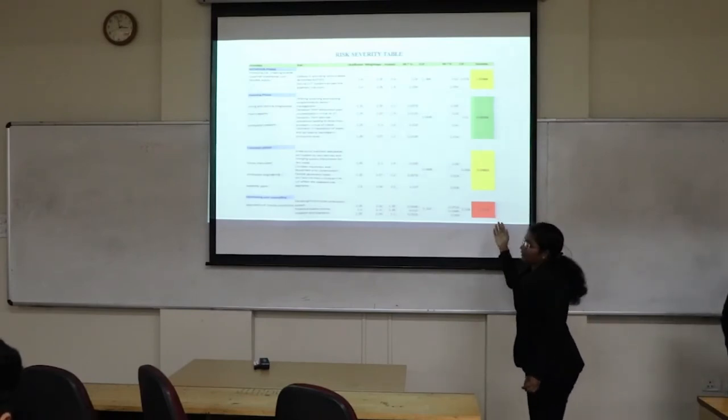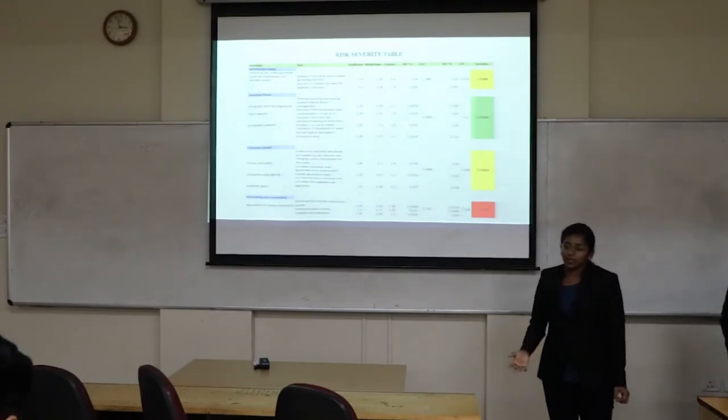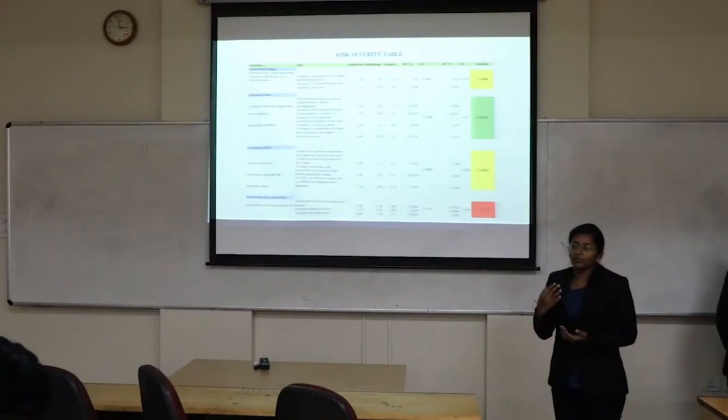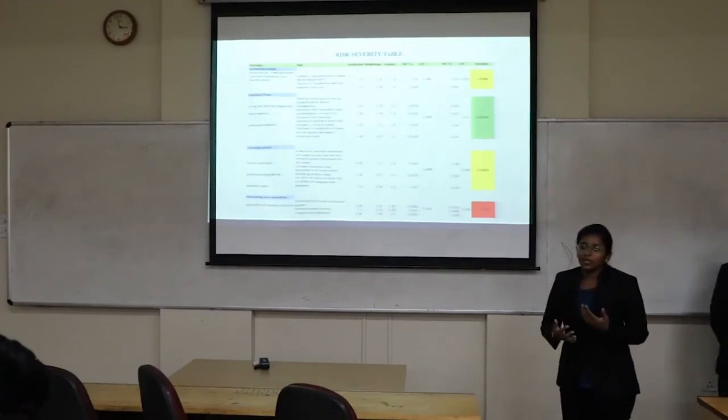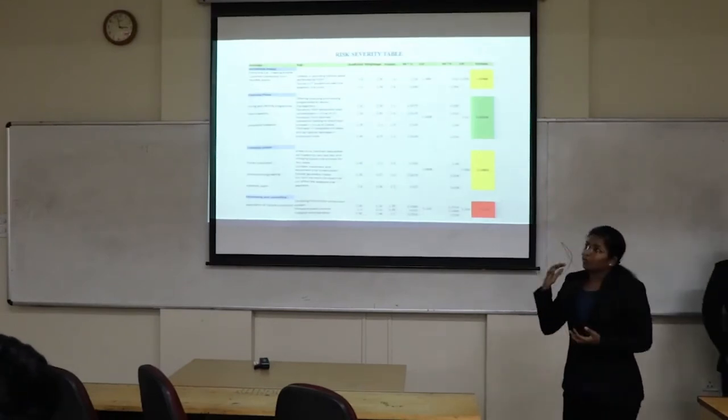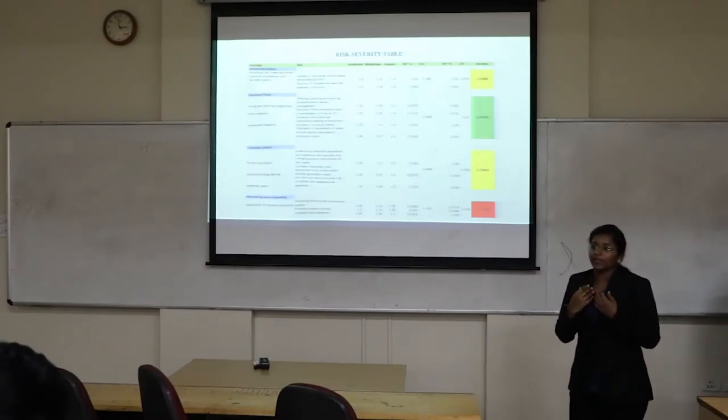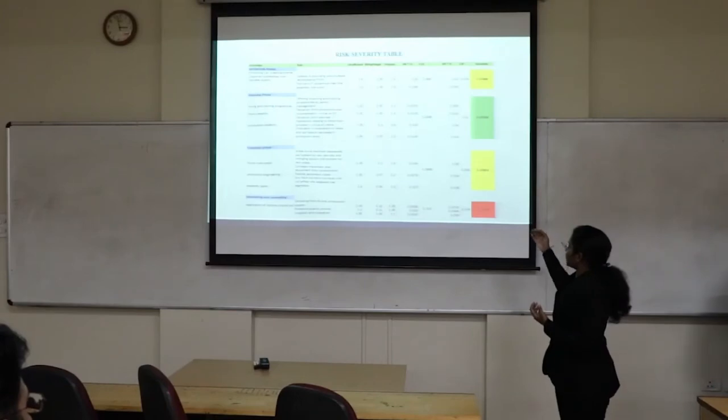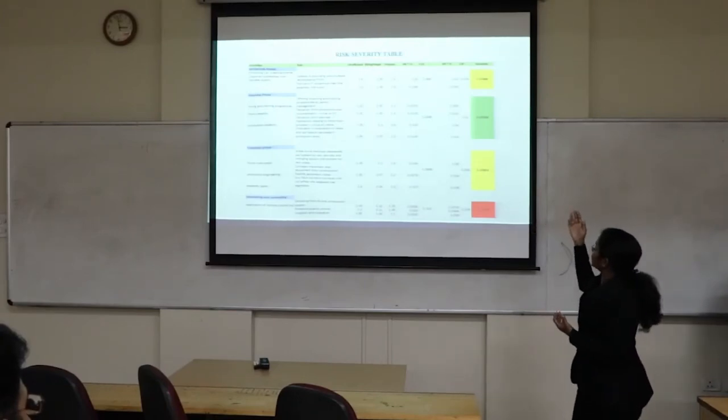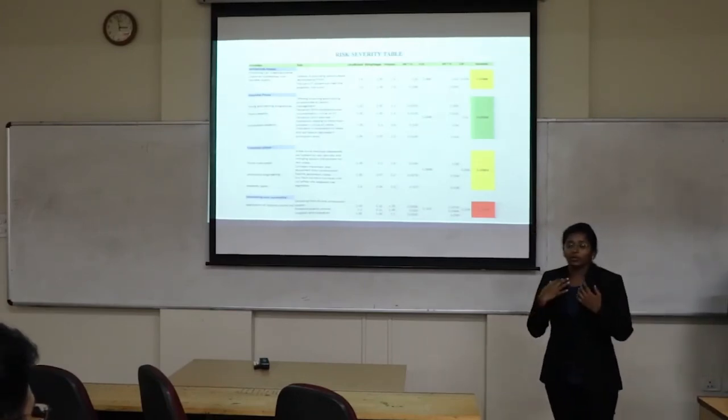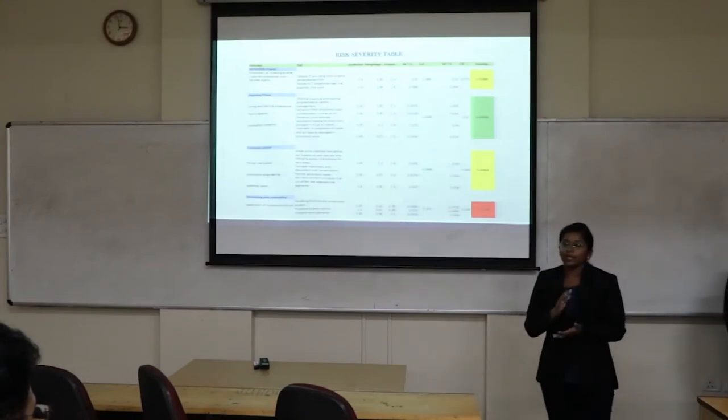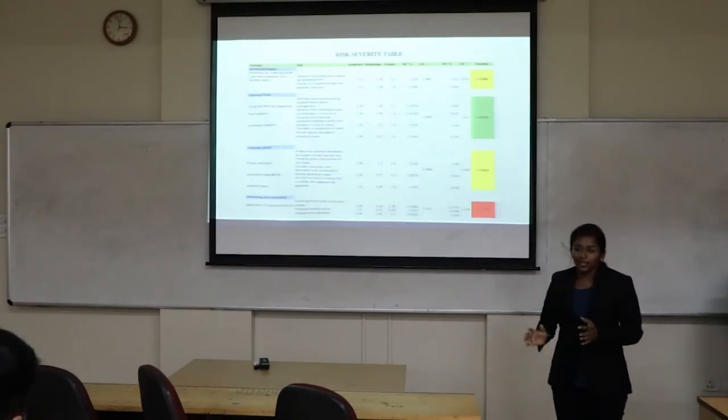The red means the risk is severe, a major risk. We have to take steps in order to reduce the risk. Yellow means minor risk. We can take steps to reduce the risk after we are done with the red one. Green means the minor one. We can actually avoid that risk if only the status of that particular risk changes.